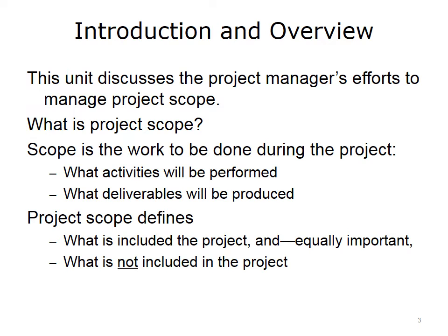However, any expansion of work, called scope creep, is very important to manage because it can be very destructive and can put the success of the project at risk. Added work in scope creep hasn't been planned, and the resources haven't been set aside to do it. As a project manager, you'll want to make sure that no work is added to your project unless it has been explicitly considered what the impact will be on all the resources and staffing and any other activities that might be affected. This will be covered later in the unit.